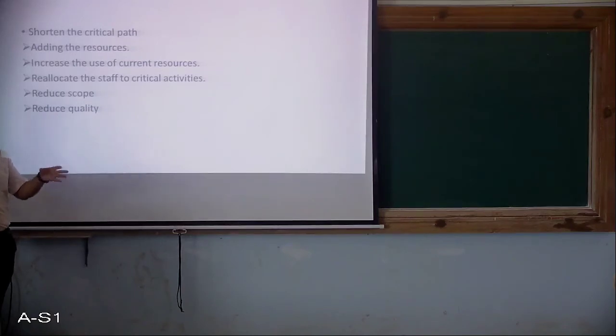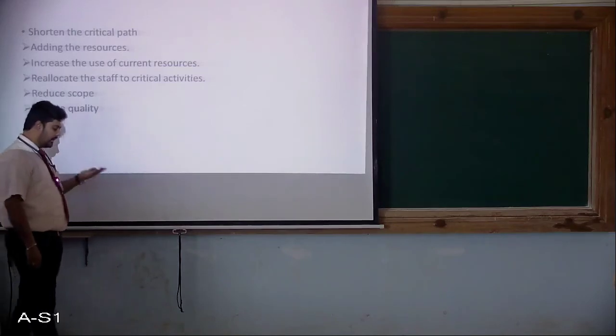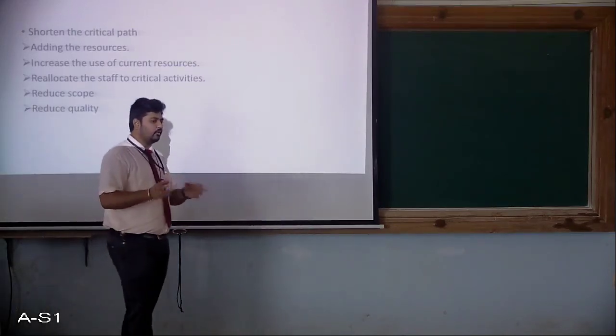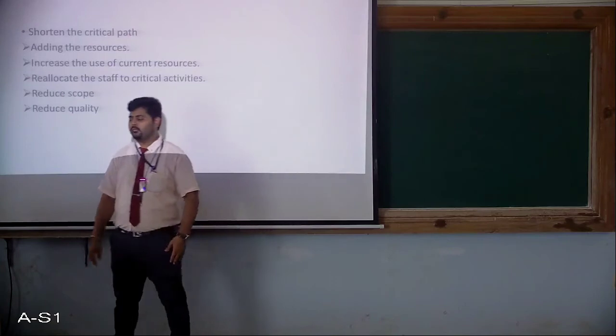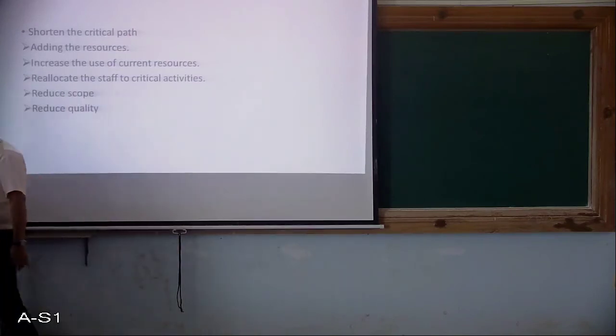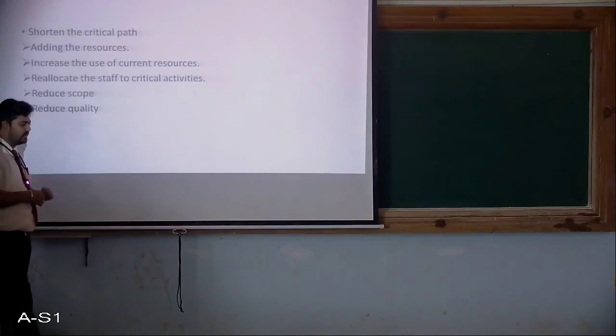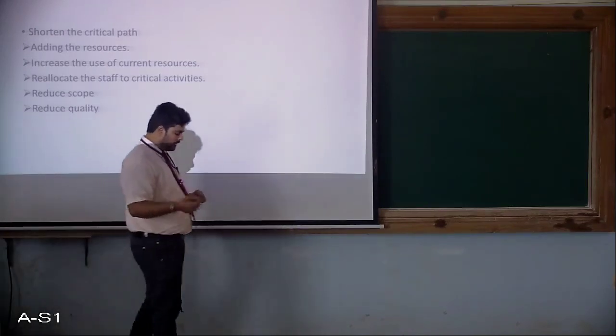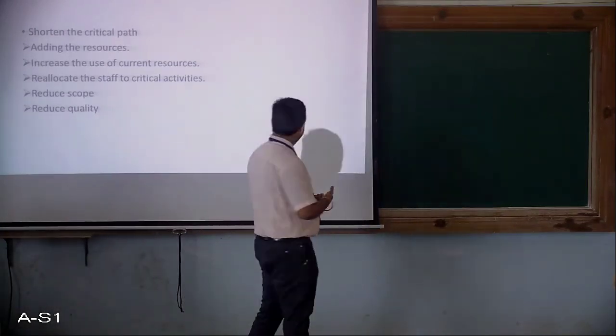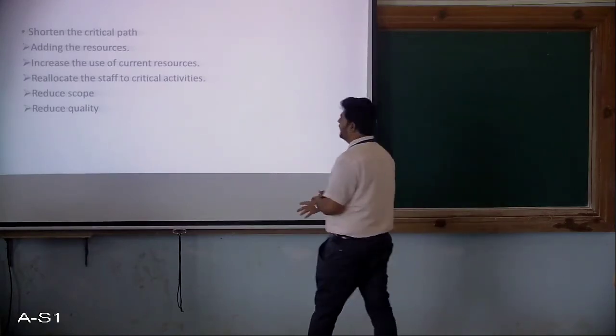So in one project, we are going to identify which are the critical activities and non-critical activities, out of which you can add the resources from non-critical activities. And the second one is increase the use of current resources. Again it comes for any type of equipment, or it can be in the form of manpower. Which is the second one, increase the use of current resources.